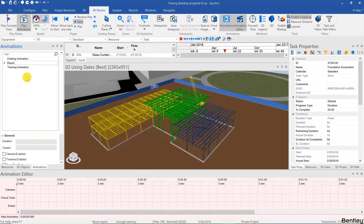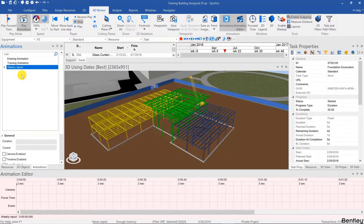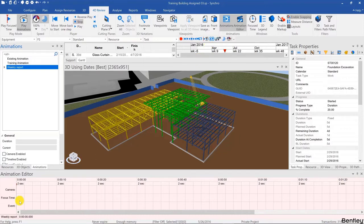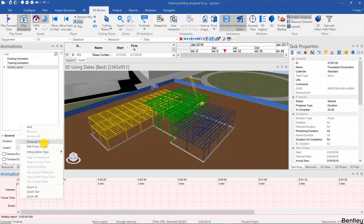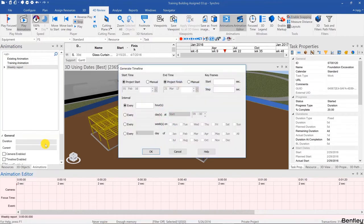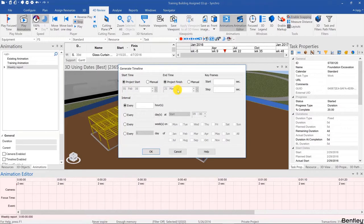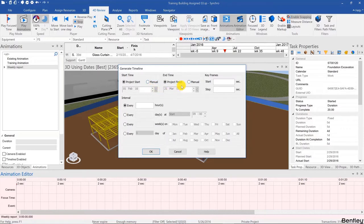The first difference between creating an animation and a report is that instead of capturing the focus time keyframes, we're going to generate them. Right-click and then Generate Timeline. It will suggest automatically to start from project start and project finish, but if you want to create a look-ahead report or some narrower timeline, you can choose manual dates. I'll keep it as is.